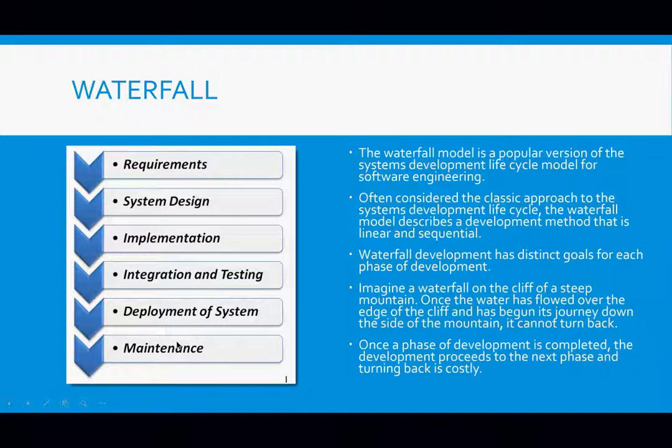This is the analogy that I will use to define waterfall. It's like water falling over a cliff. If you have water flowing to the edge of the cliff, it cannot go back again. That is the same thing with waterfall. Development starts from requirements, goes to system design, implementation, and then integration and testing. If you want to go back to the top, it becomes difficult and also costly.